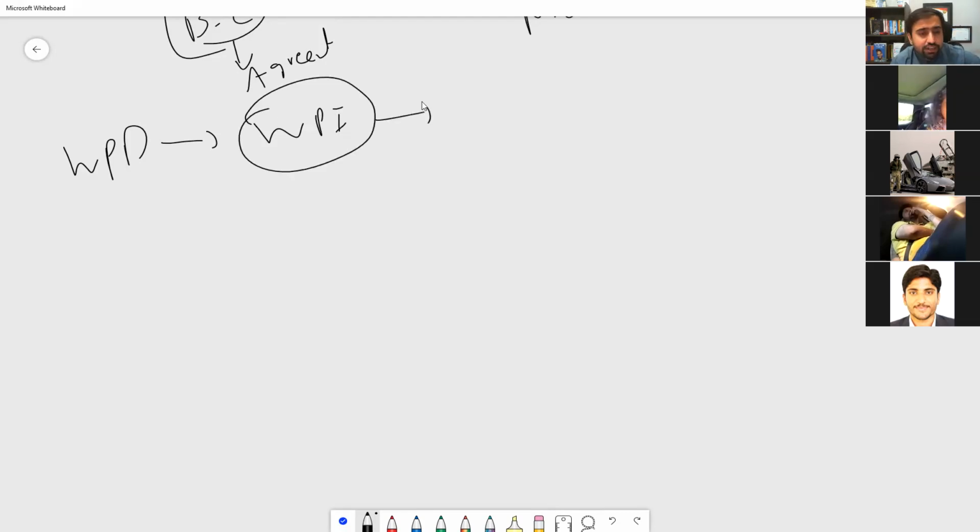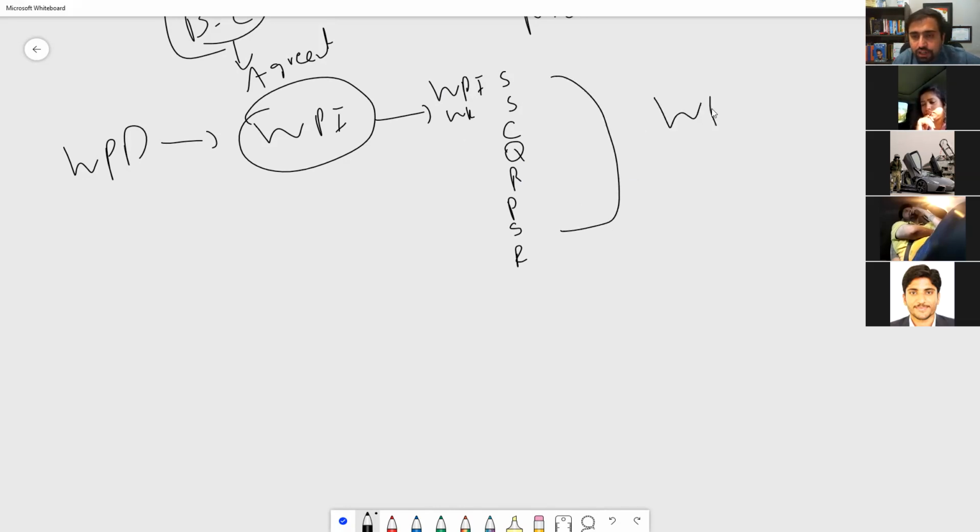All departments produce their work performance information. The project manager gets all the work performance information for scope, schedule, cost, quality, risk, procurement, stakeholder, and resource. There are 10 reports, and he cannot share them all with the stakeholders. So he combines all the reports, and we call it the work performance report, an electronic form of reports that we share with people through manage communication, and they become project communication.